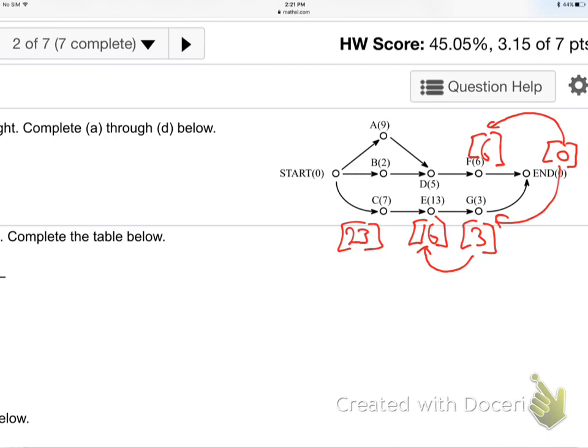If you have 2 options, you take the higher one. Let me show you. Let's do the top now. 0, add 6, add 5. I'm sorry, add 5. What's going to be above D? 11. Everybody good with that? See what I'm doing? So I went 0, add 6 is 6, add 5 is 11. Good so far. And now, what do you do with that 11? Again, we're doing the arrows backwards. Add 9 and add 2. Right, separately. You just keep them separate. 11 add 9 is 20. 11 add 2 is 13. Like that. We good to there? So I'm just walking backwards, adding as I go.